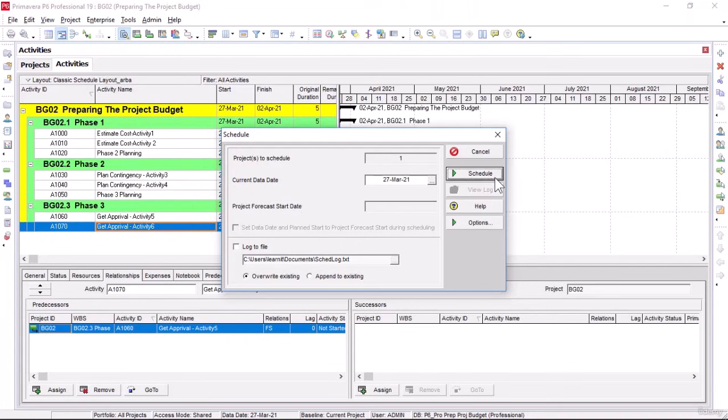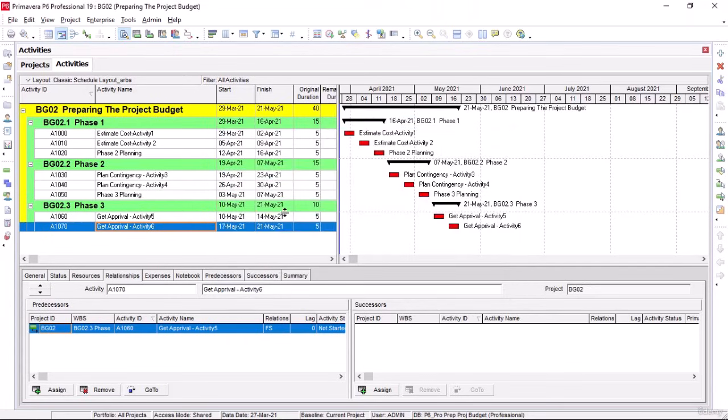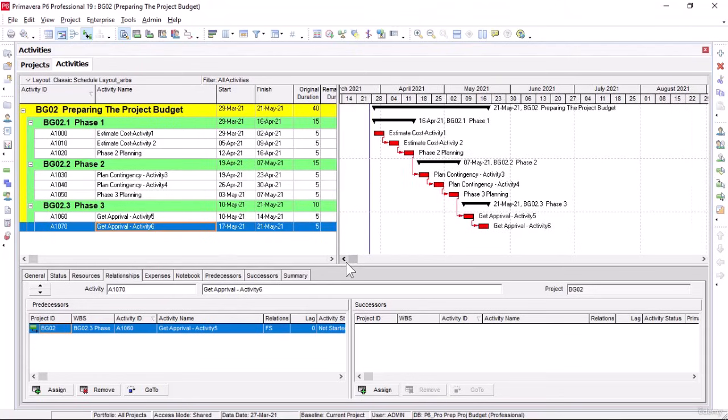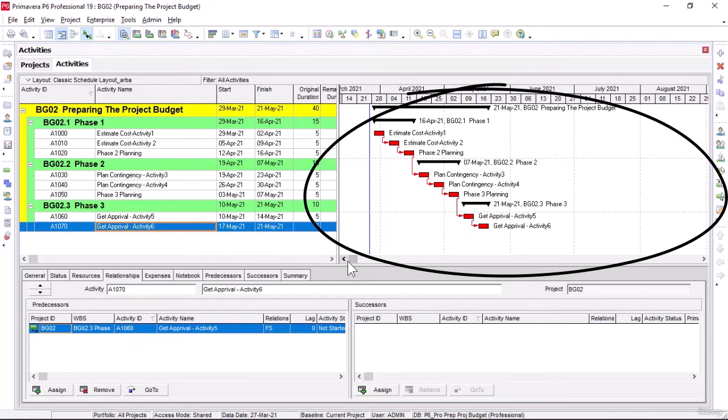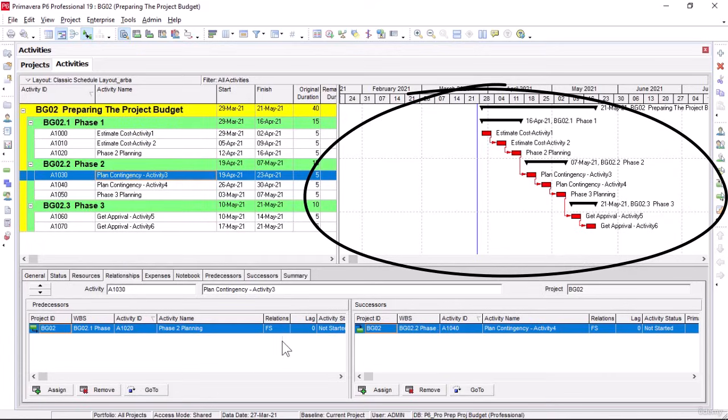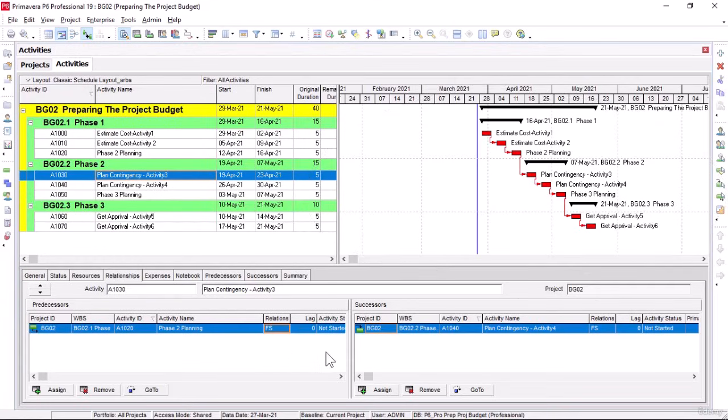And as you see, immediately after this, the finish to start relationship appeared between our project activities in the Gantt chart area. So normally this is how we can always define any type of relationship such as finish to start, finish to finish, start to start, or start to finish between our project activities as needed. So that's it about this lecture. Let's move to our next lesson now.